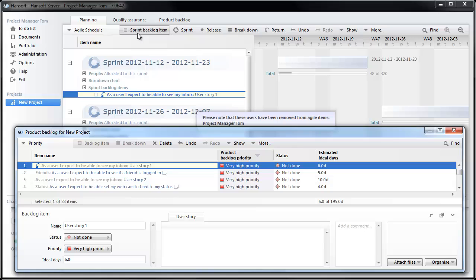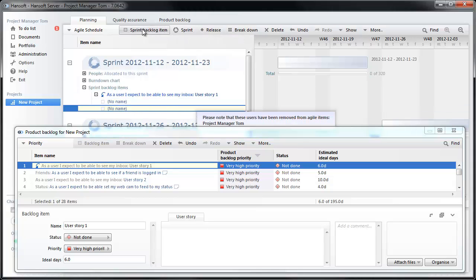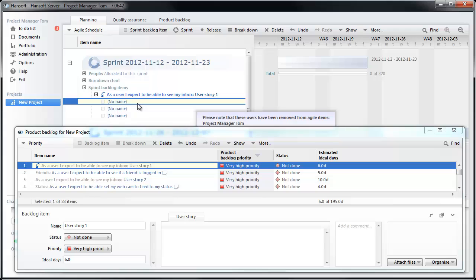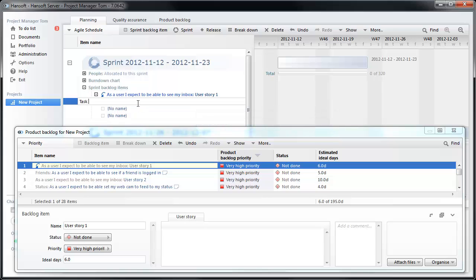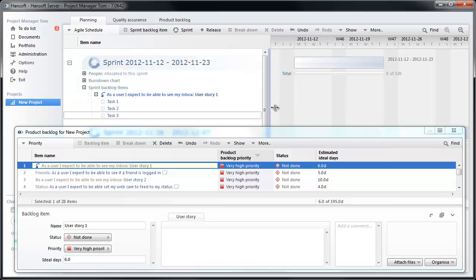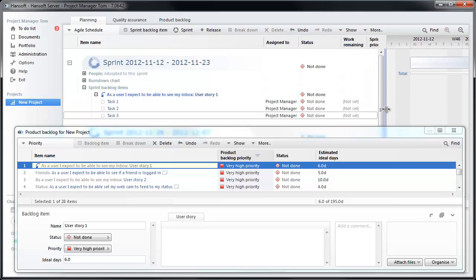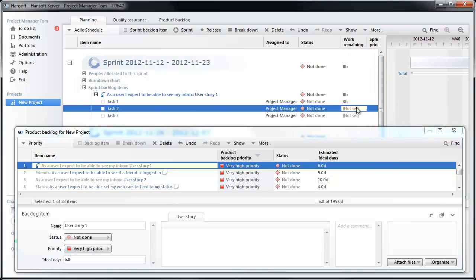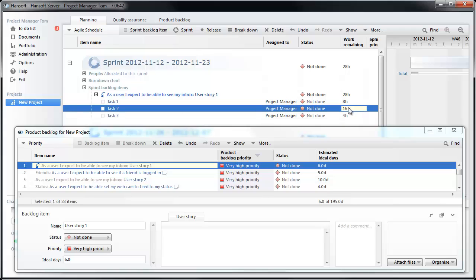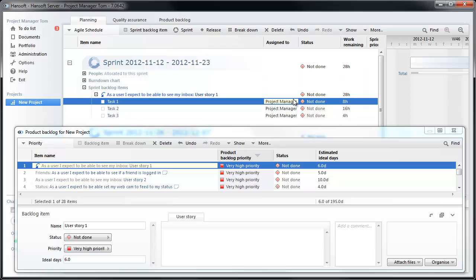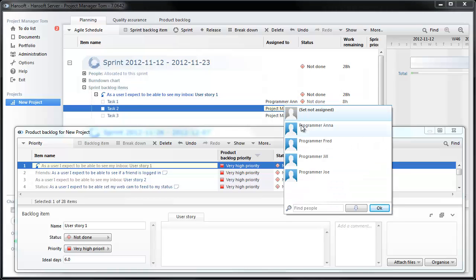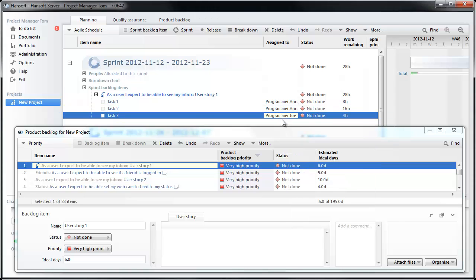Then we're going to break this down into a number of tasks needed to complete this story. So I'm just going to put task one, two, three here. We're probably going to talk a little bit about how big they are. So let's add some estimates. Let's say eight hours, 16 hours, four hours, something like that. And I'm also going to assign these to our team members. Let's say that programmer Anna does these two and programmer Joe does this one.